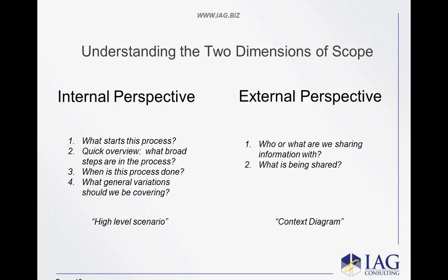What do you do when the stakeholders have extreme conflicting goals for the project? Brandon, that one's a tougher one because it depends on what basis the conflicting goals are set. Sometimes they are structural conflicts, meaning two different executives have a different view of how the process is going to work, and that's fine. You just need to get those two people in a room, and have them bash it out and work on it together.